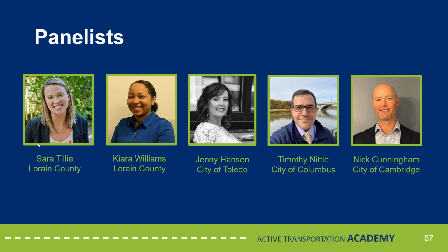I think it pretty much flowed the way that we initially thought it would. Construction, as you can see, was wrapped up this year. One of the initial hiccups was that there was a little bit more utility work than what we had expected. We had to work a little bit more with our public utilities department. Columbus, you may or may not know, has some pretty stringent stormwater requirements that most other cities don't have to meet. And so even though we are a city agency, public service, we still have to follow public utilities guidelines there.